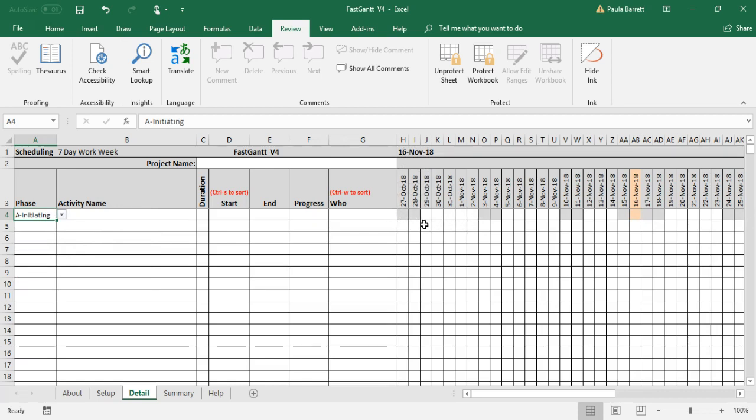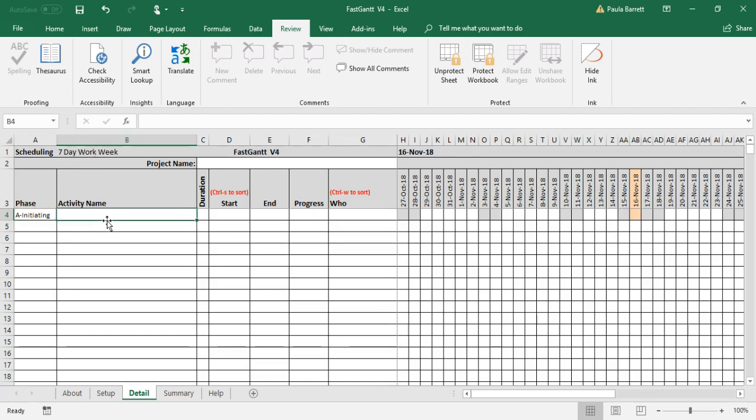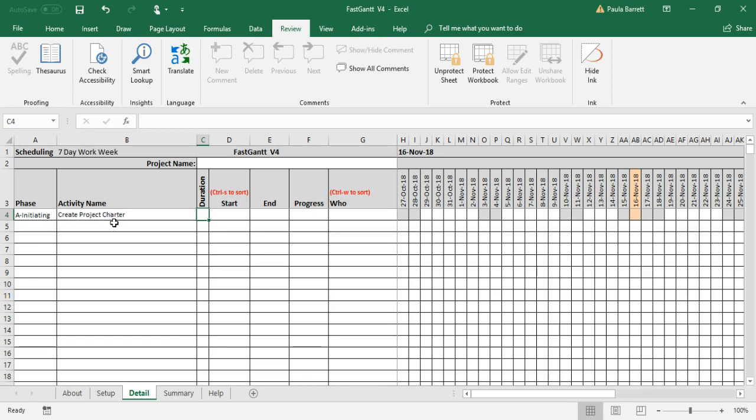So we'll normally start with initiating. You can see once we do that, our weekends are shaded, which means those are our weekend dates. You can also see, remember we made November 15th a holiday, so it's going there. Notice we're on seven day work week as well. We're reminded how we're scheduling. So we put in our, perhaps create project charter and perhaps it would say we'll give that a duration of four days.